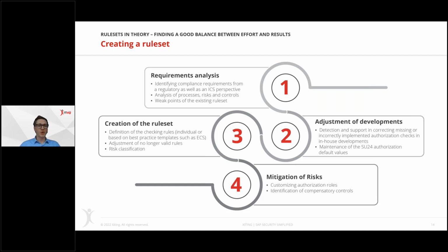We'll come to that in a minute on the next 2 slides, to clarify what I mean by that. Once we have created the rule set and executed the risk analysis, first on role level and second on user level, we start with the remediation, and once we are done with the remediation, it's all about the mitigation of risks.